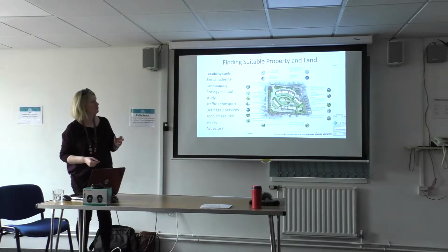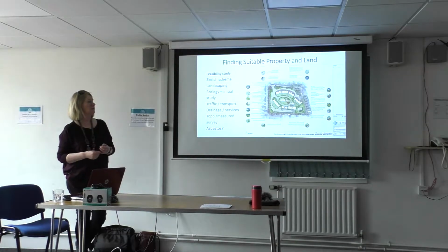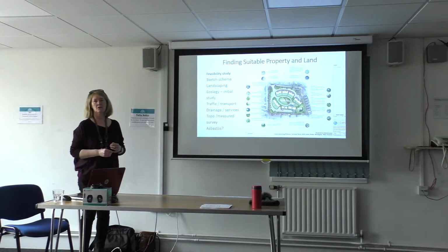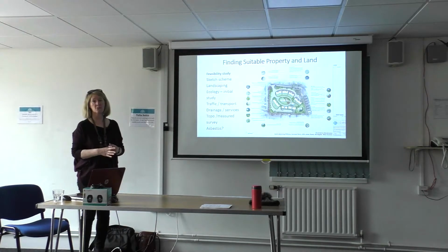Also, particularly on a greenfield site, you might need to do an initial ecology study, because there might be protected species on there. Obviously there are badgers, bats and newts, but there's also some flora that's protected as well. So you need to be very careful about disturbing any of those parts of the ecology of the site.